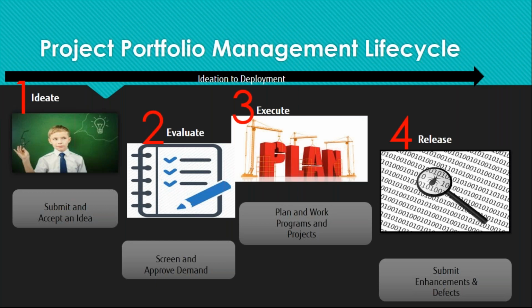In the PPM suite, what ServiceNow offers is that submitting an idea can be done by any user. You can add it to the portal view where anybody can submit an idea, and if that idea makes sense to the business goals and aligns with the strategies of the company, then the demand management people can accept the idea. So whenever an idea is submitted and accepted, it becomes a demand.